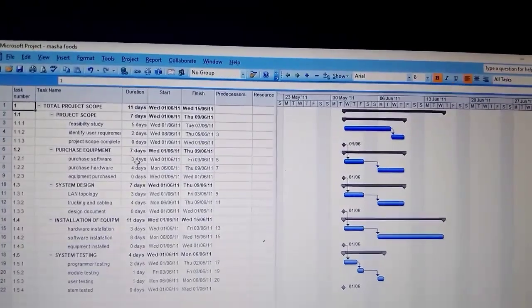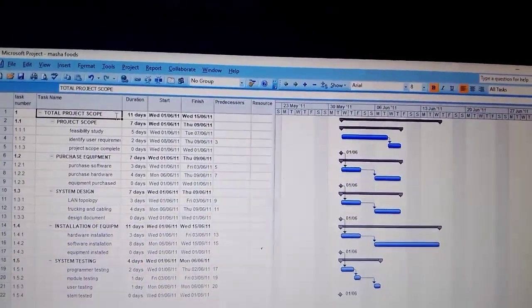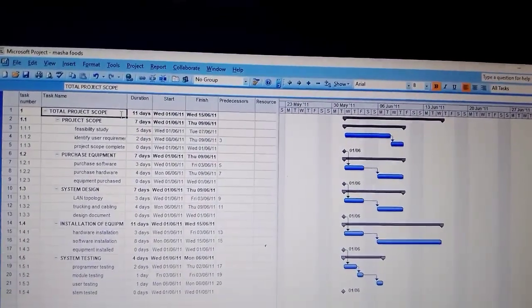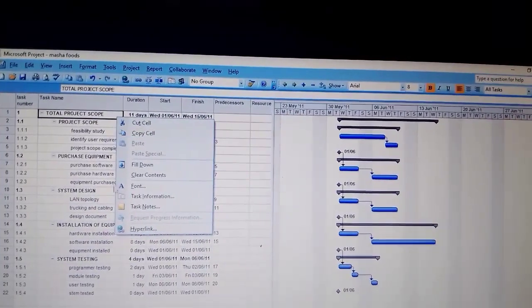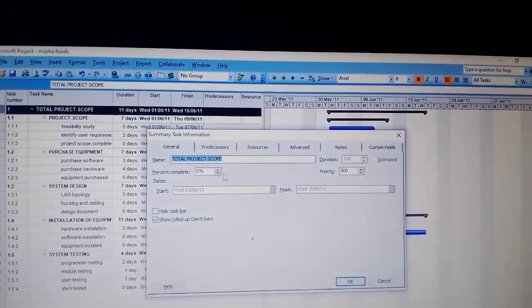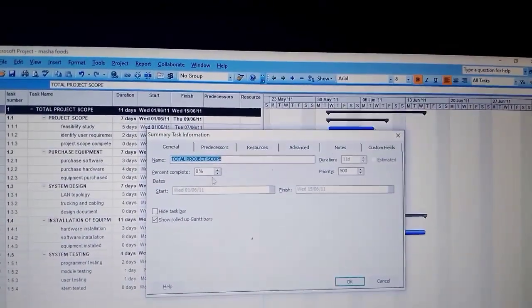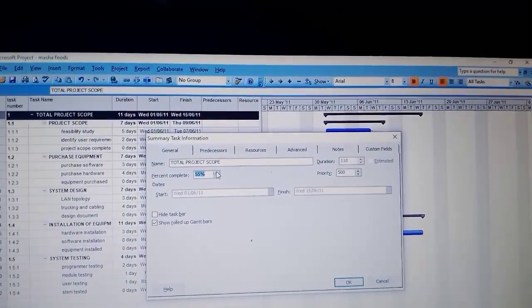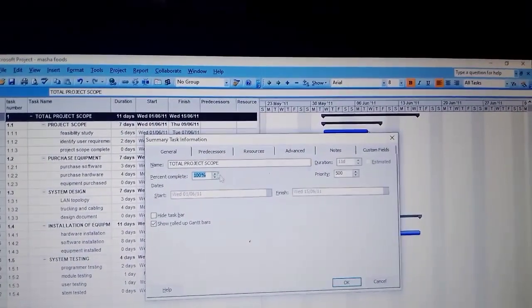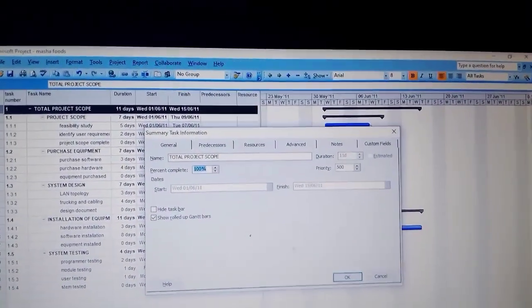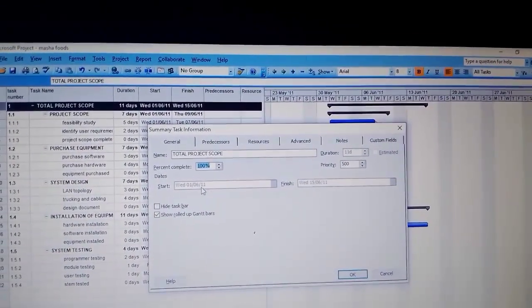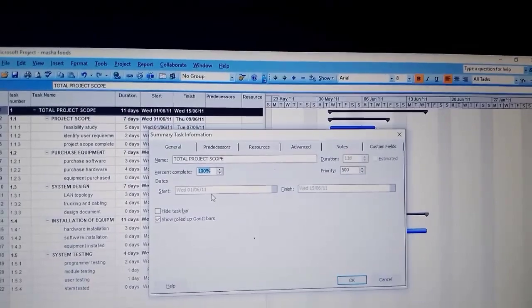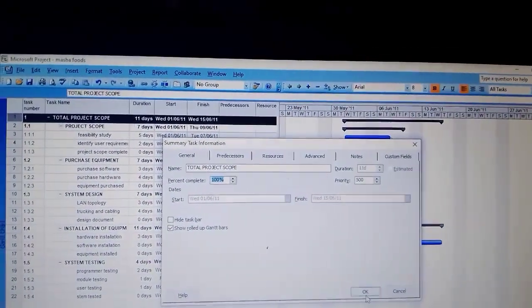You come here in the total project scope, then right-click and go to Task Information. Then under percentage complete, you go up to 100 - 100%. Our start date is there, June 1st, 2011. So it is 100% complete. Then you press OK.